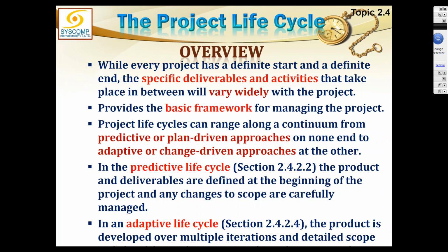First things first, you complete only a small portion and produce some results, and based on those results you design the next iteration and then the next iteration, and meanwhile the project can keep changing and you can keep moving ahead. So with a highly changing scope, you keep developing an adaptive life cycle, and that way you can complete the project. This is normally very popular in IT. This is called agile.